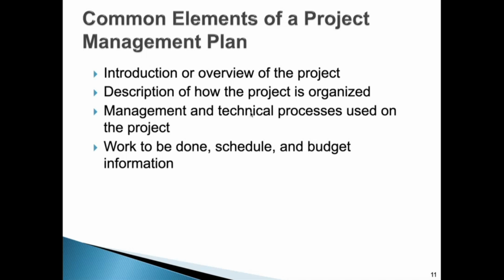What is the technical lead? This, this, and this. And then you put all the tasks that he should take care of during the project. You also put the name of that person in this table. Because in the project charter you usually put only the titles, but in the table you put the title and you put the name in front of it as well.